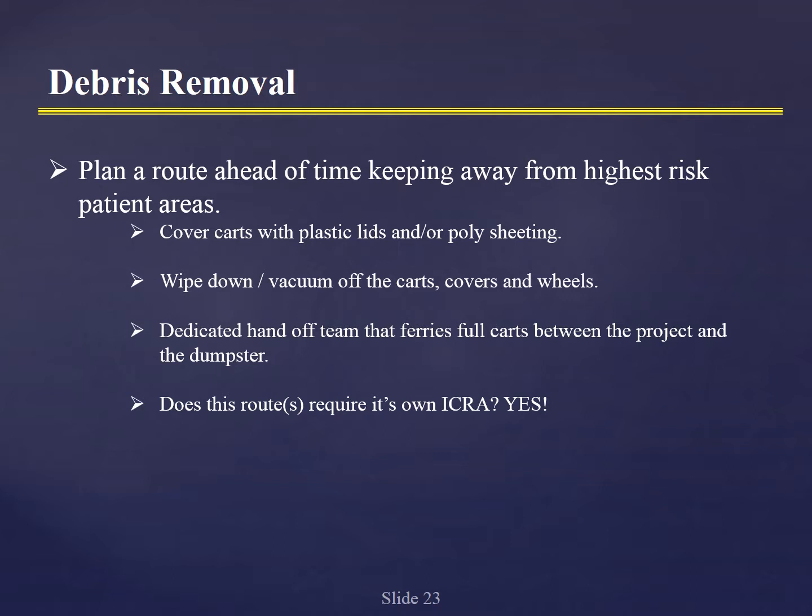We certainly have to cover carts and sometimes wet down the material. We need to really wipe them and vacuum them. Too many times carts go in and out of construction projects and they're just filthy dirty. And it's kind of funny, you have a cart and you have the debris inside of it covered up, but the cart itself looks like debris because it's just covered with dust.